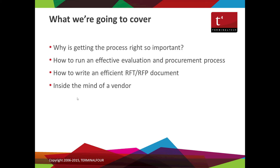RFP is used more internationally and by US commercial companies, while RFT tends to be used in more publicly funded organizations or government agencies in Canada, the UK, and so on. You may also see the phrase RFI — a request for information — which is a more informal process where you send out a request to many vendors just to get background information. You then look through that and either proceed into an RFP process or use it as the basis for your evaluation.